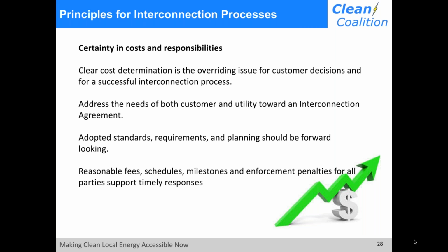Both parties to an interconnection agreement should understand the basic needs of the other. Customers and their lenders require firm information to determine whether or not to proceed with the project. Contract provisions, such as non-binding estimates, or the potential for future additional costs to be applied after a contract is signed or a project is even in operation, are extremely problematic for an interconnection applicant. Such uncertainty adversely impacts the cost of providing electricity to the utility from impacted projects.